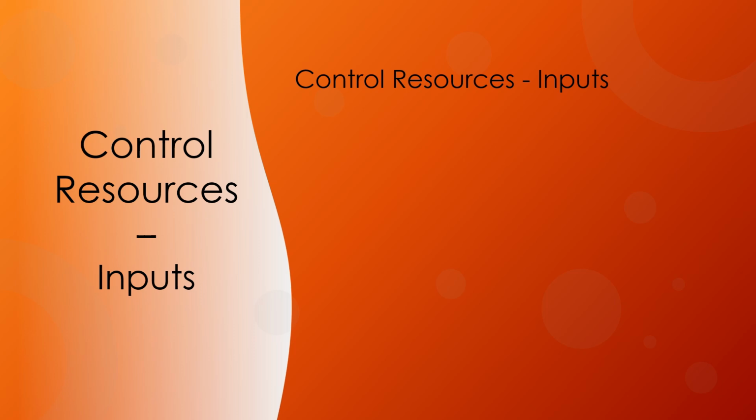The set of tools and techniques to this process include data analysis, such as alternatives analysis, cost-benefit analysis, performance reviews, and trend analysis. Problem solving, interpersonal and team skills such as negotiation and influencing, and project management information system.